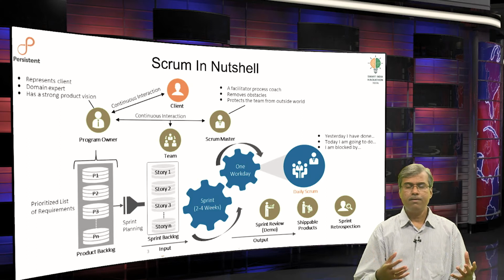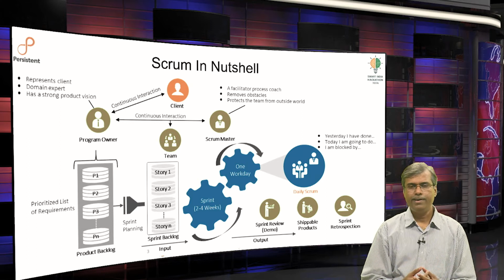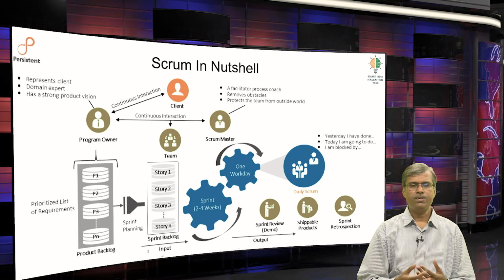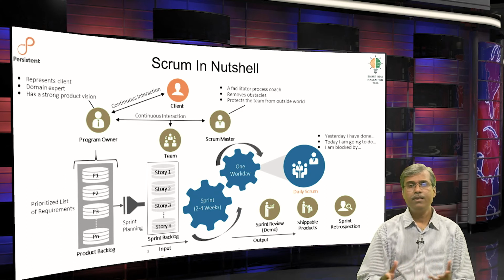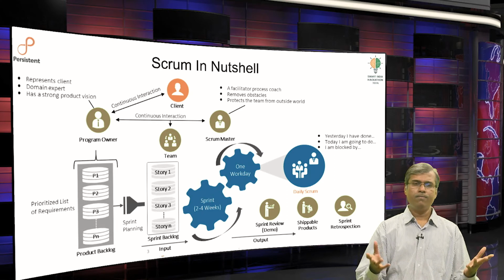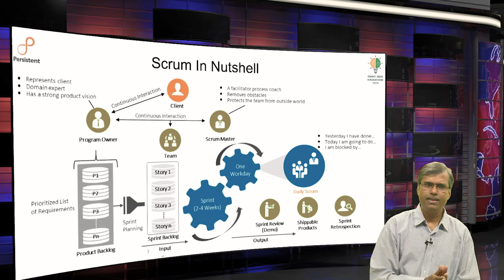So, these team members would discuss their points of view and then arrive at a common consensus saying whether it is 5 or 13. It could be either of the possibilities, or they could even say, oh no, both of us are wrong, let's size it 8.